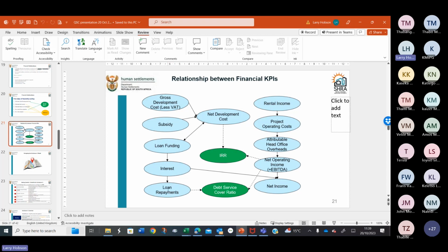So we need to reduce our loan repayments, which can be reduced by, can we get a lower interest rate from our lender? We can try that. But we're probably not going to get very far in the current environment. The amount of the loan funding determines that; we're borrowing too much, in other words, to be able to repay.